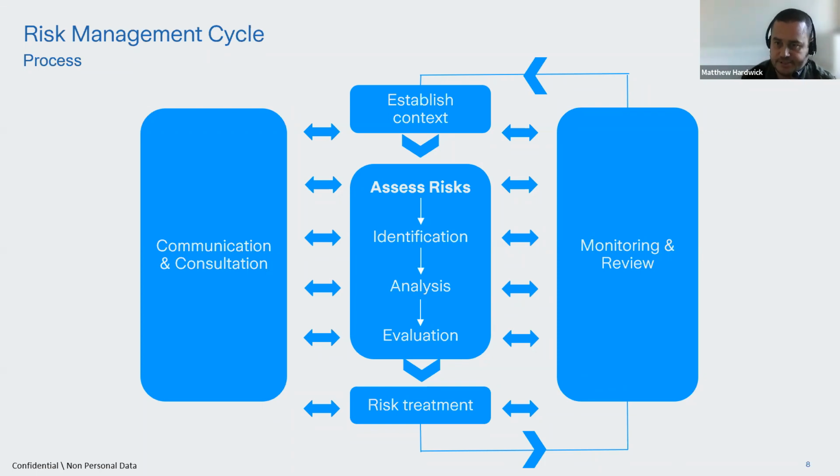As I say, it's very much a cyclical process. So what we've identified, actually, we may come back to review this 3 months later, 6 months later, and decide that actually something slightly changed here. That service delivery risk that we thought we'd got that was due to recruitment, actually we've now recruited into the vacant post. So we've got no vacancies, but they're now in a process of upskilling. They're not yet fully signed off in terms of the work that they are doing. And so we've still got capacity issues.